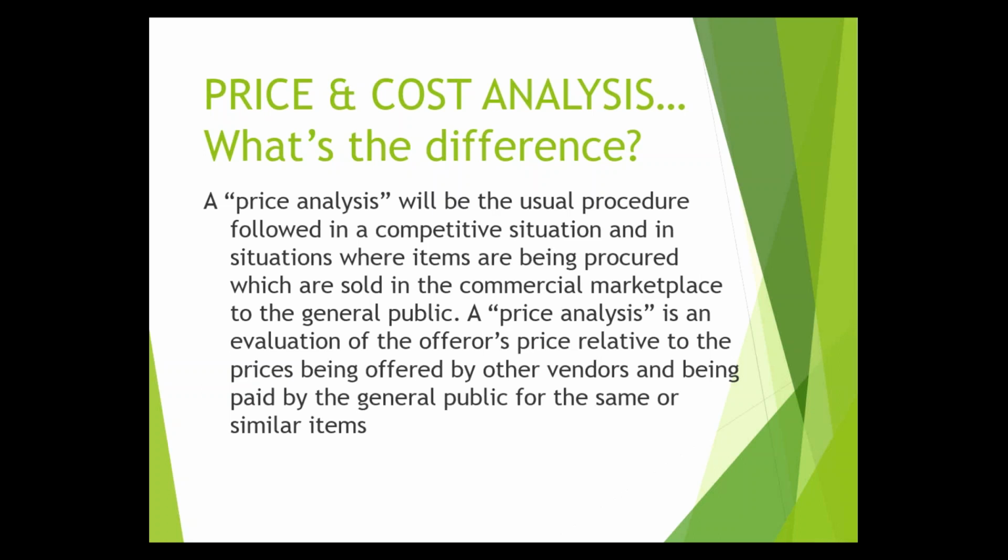So if you need to go outside of the range that you've determined in your ICE, you went back and looked at your ICE and your prices fell outside of it, then you're going to do a price analysis and determine, well, here's why we're going to pay more or pay less for this than a competing product.